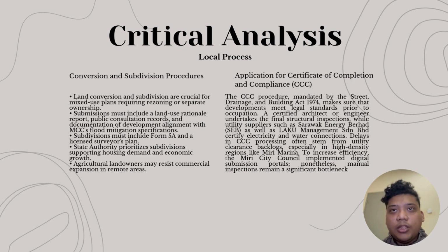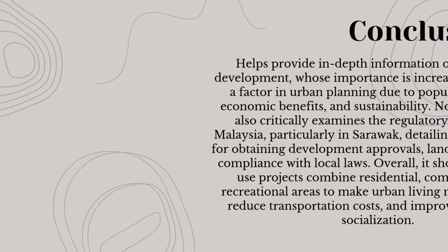Delays in CCC processing often come from utility clearance backlogs, especially in high-density regions like Marina Miri. In order to increase efficiency, the Miri City Council has implemented digital submission portals. However, manual inspection remains a significant bottleneck.